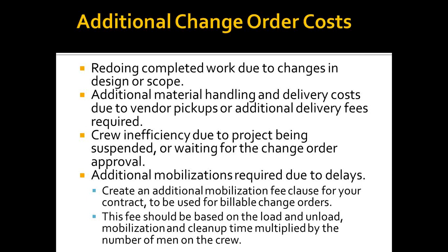And yes, certainly you can, but the customer's typical expectation is that he's going to pay fairly the same unit price that he would have paid on the original patio. But you're going to have to take up some of the pavers, you're going to have to take up the edge restraint, you're going to have to add sub-base. So there's a lot of work that would have to be redone to add that additional 100 square feet.